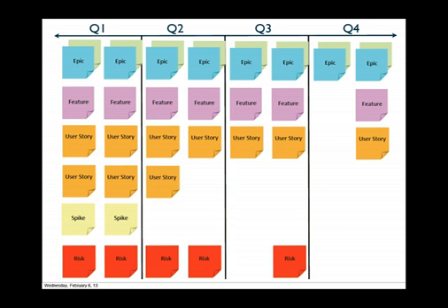When they did that, the challenge was they got to the next release planning horizon, and they hadn't sufficiently risk reduced that backlog, and they had no idea what it was that they were going to build. So this whole destabilized, unable-to-plan metaphor just carried forward into the next release. So we have to be disciplined in every release boundary, every quarter, that we maintain some capacity for doing the work that's going to help the next release be stable.